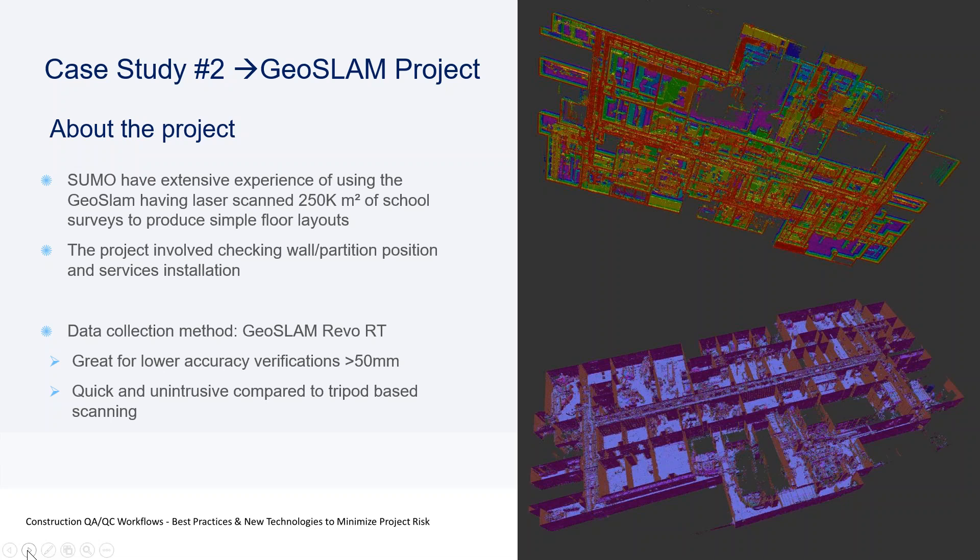The GeoSlam is not as accurate — you're typically looking at plus or minus 30 millimeters across the whole building — but you can cover huge areas. We're talking about 6,000 to 10,000 square meters in a day, compared to 800 to 2,000 square meters with traditional scanning. We were using GeoSlam with partitions and services for this biomedical facility because if a wall is within 50 to 100 millimeters of its position, it's probably OK. Likewise with ductwork. We certainly wouldn't use GeoSlam data for steelwork verification — you need the accuracy of high-definition scanning for that.